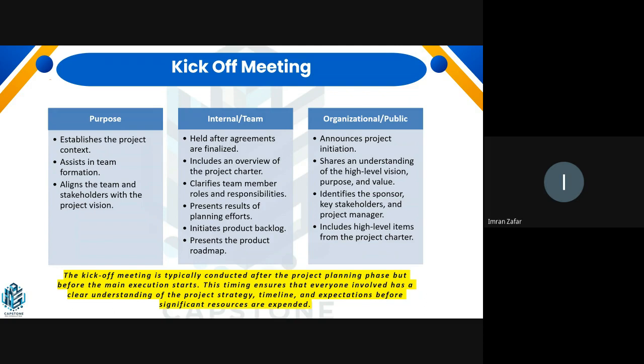Okay, so once you have your project charter, ideally the first thing that we as project managers should be doing is to identify our stakeholders, because in the project charter or the business case we have a very high level list of stakeholders. There may be many other stakeholders, so it's important to identify those stakeholders, engage with them, and then